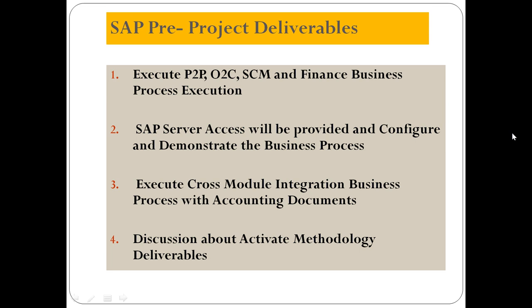For example, if you want to build any construction, we execute the project phase by phase. The same way, in an implementation project, in an S/4HANA implementation project also, we have phase-by-phase activity. So first we have a discover phase, then a prepare phase, then an explore phase, realize phase, deployment phase, and the run phase. So what are all the activities we are going to do? It is not theoretical here; this project is completely practical.